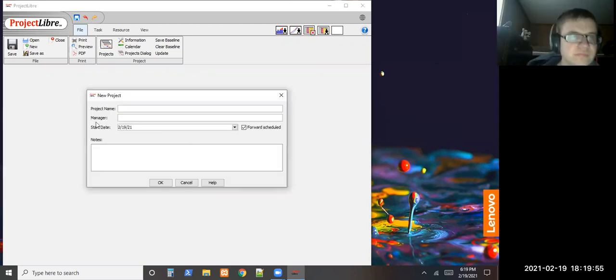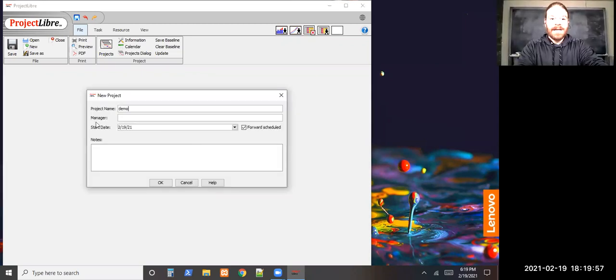Okay. Yeah, so just create a new project. I'll just call this demo. Put myself as the manager. So there's two types of dates. There's a little checkbox here. There's forward scheduled. So that would mean we put the start date, and if you uncheck it, then we get the finish date and you schedule backwards. Whichever way you want for the class. That might be nice for the class, right? Because then you can set it for May 15th and put all the pieces together, and it'll schedule backwards from May 15th. I'm just going to go forward.